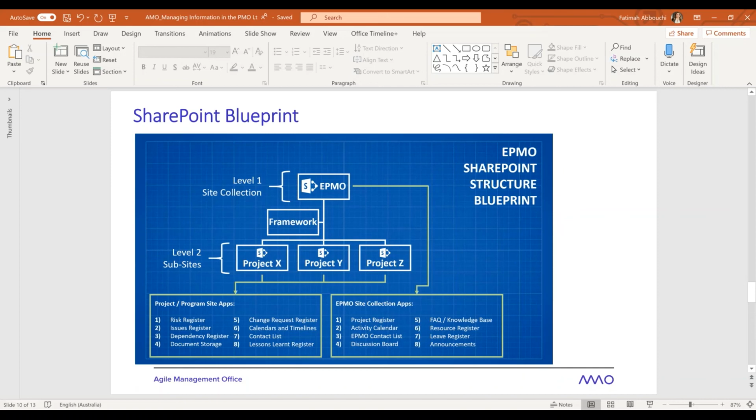When we do our P3M3 assessments, which is a global assessment used quite heavily in government actually, it always asks for 5 levels of maturity. First one is awareness, and then number 2 is repeatability, and then number 3 is well defined, and it goes up to 5.